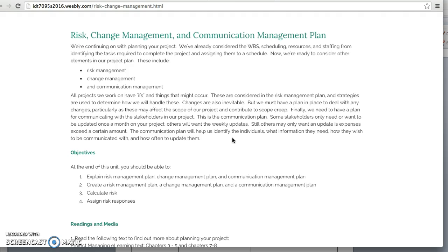And so these are the people that need to be updated and how they're going to be updated. I'm updated weekly, right? I want to be updated weekly, and my method is the 15/5. Okay, so that's one example of something that would go on your communication plan. You communicate with the sponsor weekly using the 15/5 blog posts, both the team and individual. That's something that would go on there. Do you have weekly meetings with your team? The format might be a Google Hangout. That could be documented on your communication plan. Okay, so that's kind of how you do the communication.